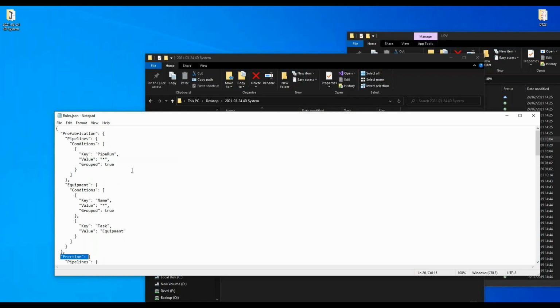Here you want to create three activities: one to remove the item from the pipeline, one to clean it, and one to put it back in place. It's created using these rules files, so you filter for the items and you define a name here for the activity. So that's the rules files.